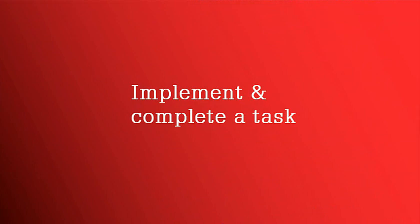Once the last task is set to closed, the requester will receive a notification that the change request needs to be set to final review complete. Change management then review and close all change requests. If however, the change request is not manually closed, it will auto close after nine days, depending on the status being set to completed and the status reason being set to final review complete.